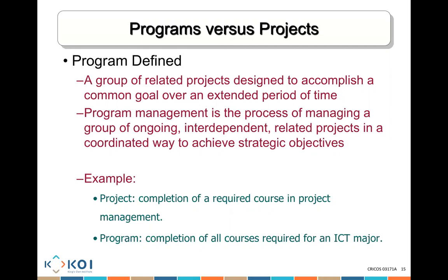So every house is a project. Now, we might have 50 houses. All of these 50 houses are part of one program. But if you finish your 50 houses, the whole program, being that village, is not completed yet. The only time that program finishes is when I deliver all 500 homes and they're ready to be delivered to the customer.